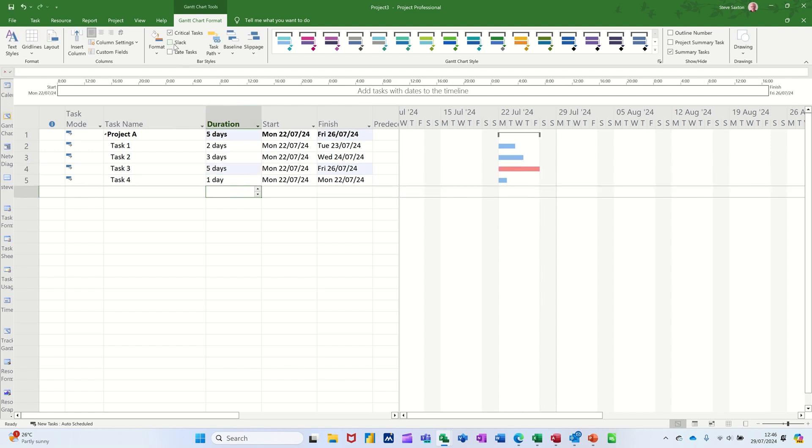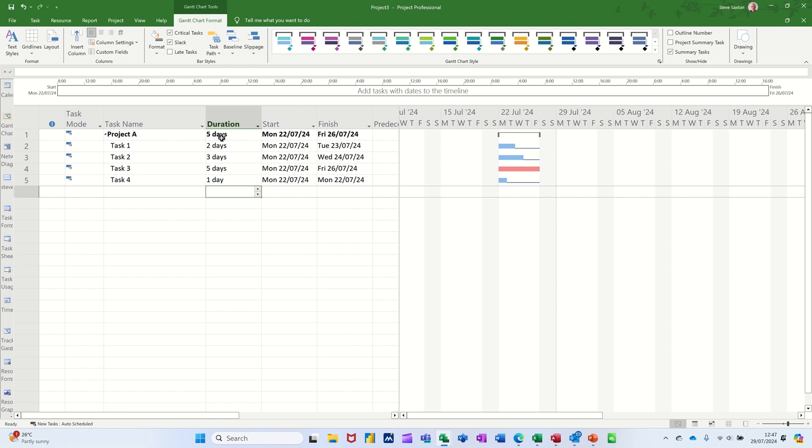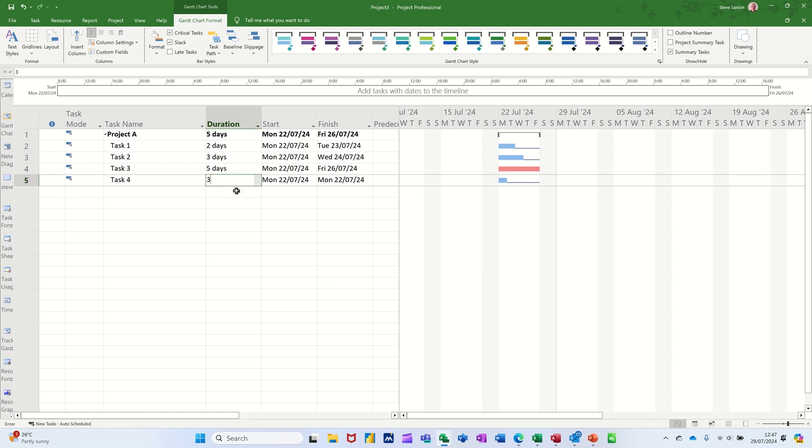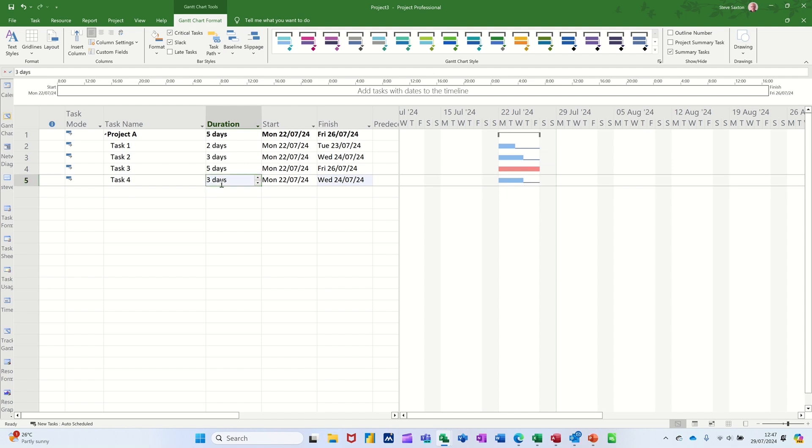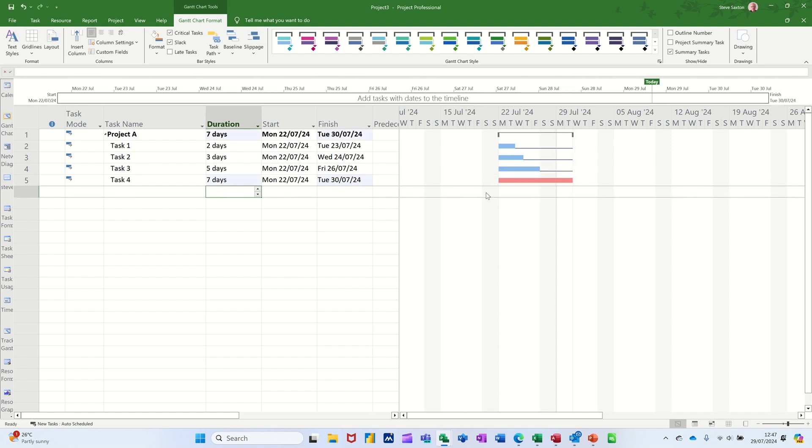Critical. Now Slack will just show you how much time each task has got before it hits the end of the project. So at the moment this five day task - the whole project is five days. This one has got four days of slack before it affects the end of the project. If I change the duration to three days, you can see it impacts that. If I change that up to seven days, that becomes critical.